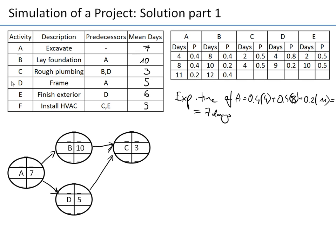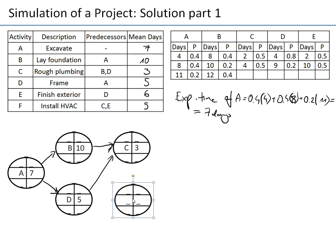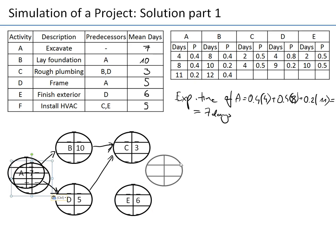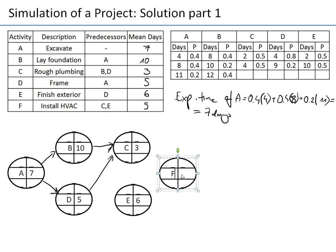Activity C takes three days, with activity D having predecessor A. I still need activities E and F. Activity E has predecessor D and takes six days. Activity F takes always five days — not just expected — and has two predecessors: C and E. Now we can compute earliest and latest start and finish times for all activities.